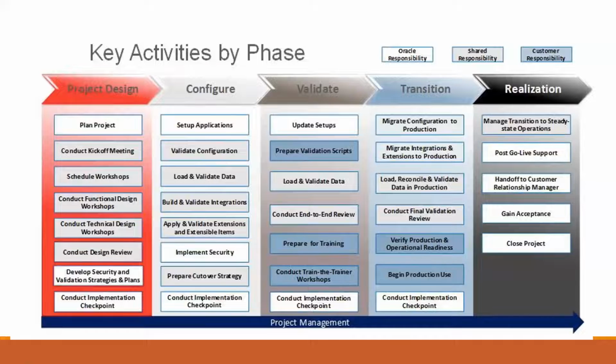So we are done for 3 months. If they want to extend, well and good. Otherwise, we start giving a handoff to them. Then acceptance, like, okay, whatever we implemented or supported, everything is fine, it's working. So acceptance means an acceptance letter is to be given, or not only given, taken by us, because we also need to show it to our management. Then we officially close the project.